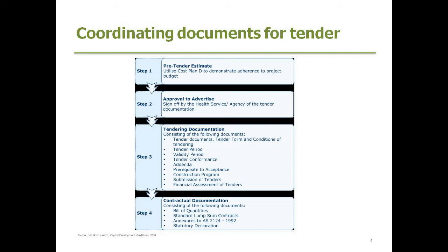I've kept a schedule of those for each particular trade package and supplier, and made it very clear that they've actually gone out to each one, that it's understood, and that it's actually come back, and that they've actually aware of what was in the package as well.